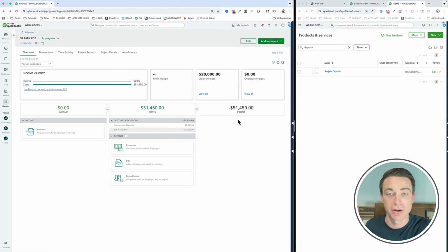So we've got to make sure that our income cycle, or our billing cycle, our invoice cycle, is frequent enough that we can recoup these costs and add our markup quick enough so that my reporting is not thrown off, okay? Now we could potentially journal entry over some of the $20,000 deposit if we really wanted to. My preferred way of doing it is keep that conservative, keep that out of our income until the final.